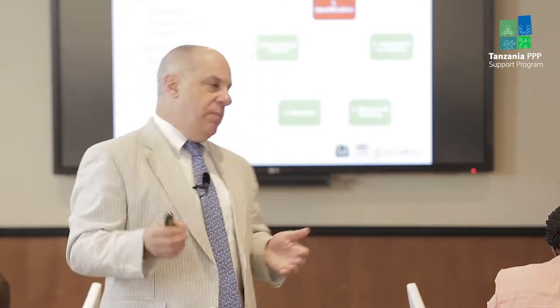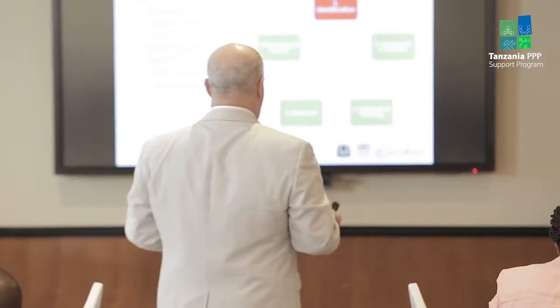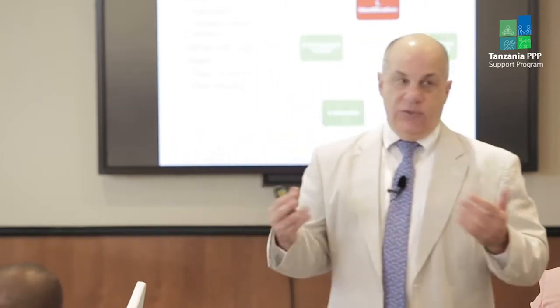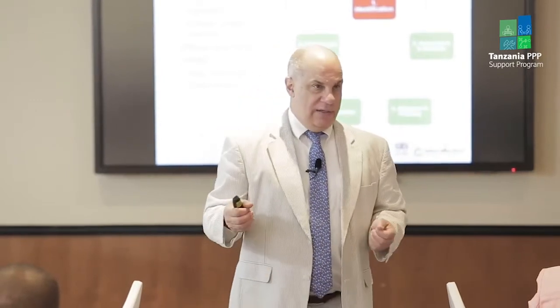There's different methodologies, but you have what we sometimes refer to as a risk workshop. Literally, you could be in a conference room, maybe smaller than this, with your transaction advisors, subject matter experts, certainly the representatives of the government, and you just start talking.